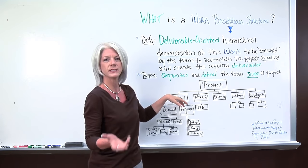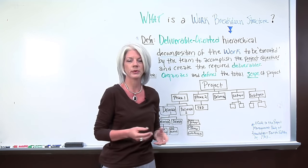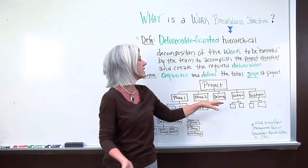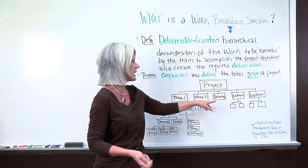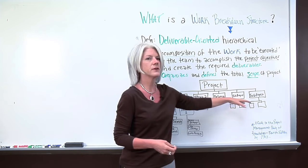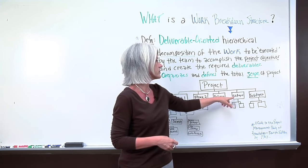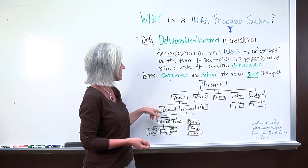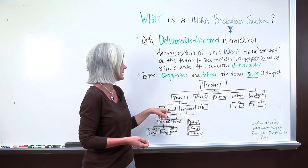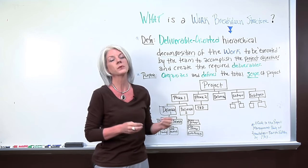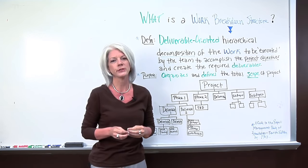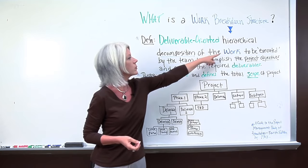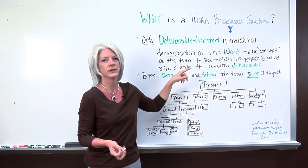So here's a project, and in this specific one you may work on projects that include phases — there may be a phase one, phase two, or other multiple phases. This one has two phases and a main high-level deliverable produced, and it also includes sub-projects that are broken down as well. If you look at phase one and break it down, it has two deliverables beneath the phase — so it's producing two main deliverables. We look at what's the work required to produce these deliverables, so we keep breaking it down to the work to be executed. Work is executed by work packages.